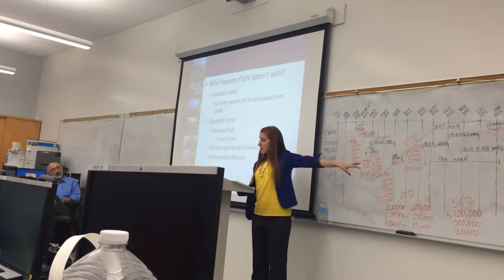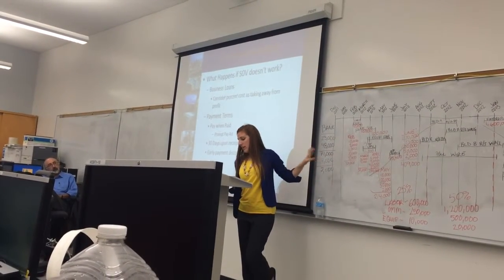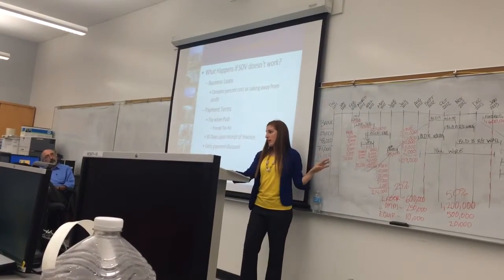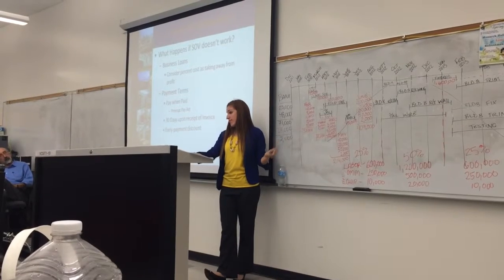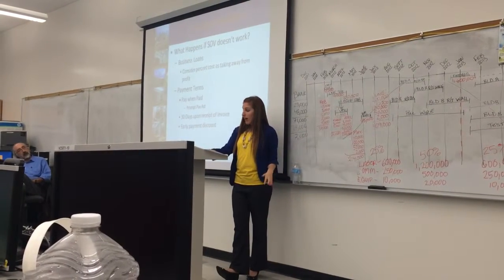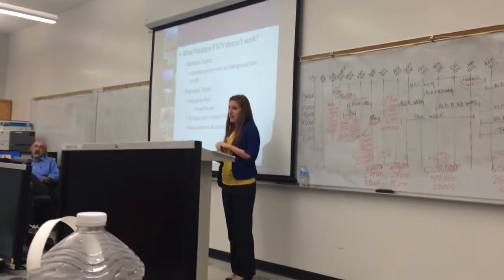Estimating when your expenses are going to occur, and then backing that into creating your schedule of values that allows you to collect money to stay cash positive. That's cash flow management in summary. So we're not going to get to change order management because I'm not going to keep talking.